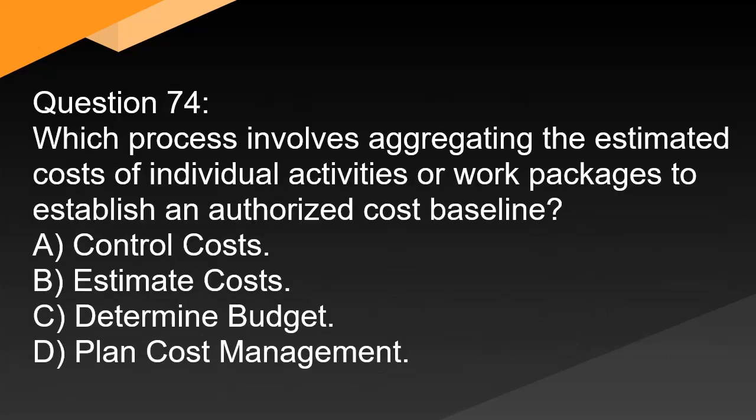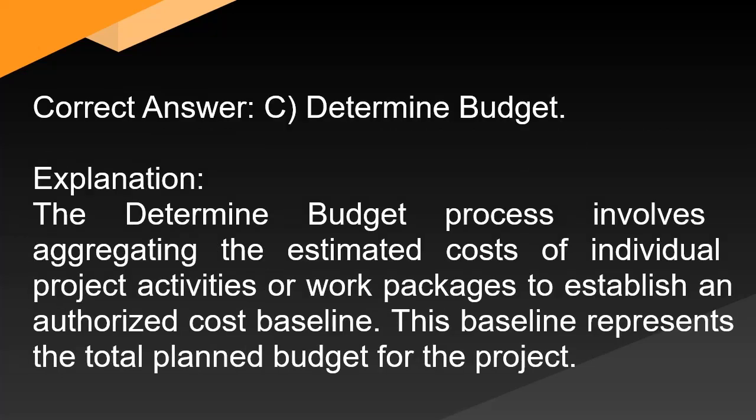Question 74: Which process involves aggregating the estimated costs of individual activities or work packages to establish an authorized cost baseline? A. Control costs. B. Estimate costs. C. Determine budget. D. Plan cost management. Correct answer: C. Determine budget. Explanation: The determine budget process involves aggregating the estimated costs of individual project activities or work packages to establish an authorized cost baseline. This baseline represents the total planned budget for the project.